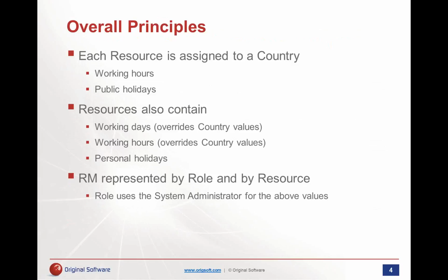So for example, I estimate that when I'm developing the new order entry system, it will take 4 man-weeks of development. We have 2 testers, however, available in 2 weeks, and therefore I need to assign 2 developers so that we can get that job done in the next 2 weeks. We are effectively planning time slots at a higher level. And for these calculations, the role will use the country values in terms of working hours, working days and public holidays of whoever the system administrator is to work all of that out.